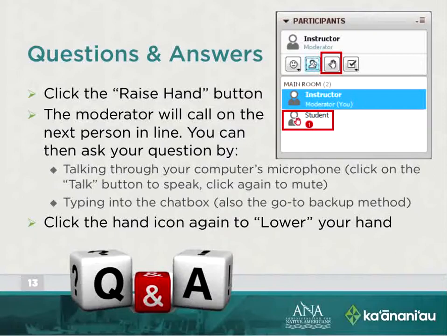We have a mismatch. What's a good example of something like that? Let's say you increased the hours of an employee to handle some unexpected workload that came in. So the employee went from 0.5 to 0.75. And you can implement that. It's not a key employee and that kind of thing. But now the work didn't get finished. It needs to be carried over, and the additional time needs to be carried over to support the work. But we can't validate it from the information we have in the grant system. So then we're going to say, well, no, we can't approve that because we allocated 50%. 50% was spent, and so we can't support that. And there's no reference to additional work being done. And so if we had that information with us, then it would expedite the review and approval of your carryover request.